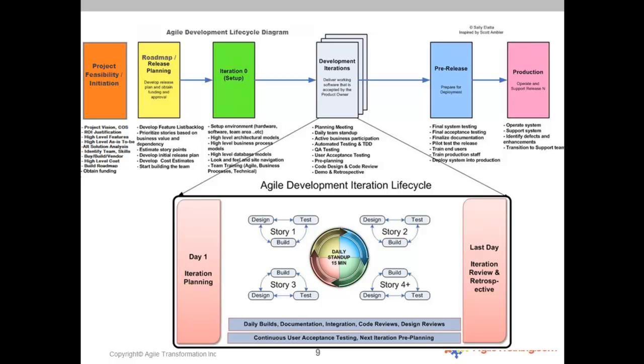And again, this model really depends on the type of project and the size of project. So some teams don't really have projects. They have what I would call minor enhancements, bug fixes, support, small work that just continuously flows. And if that's the case, you're going to need a lot less of all of these initial 3 steps, and you might really just have iterations or just have what we call a pure continuous delivery Kanban wall, where things are just coming in and out. There's no iterations even. They're just really being tracked via a Kanban wall, with items flowing through with no specific, oh, I have to do a demo here.